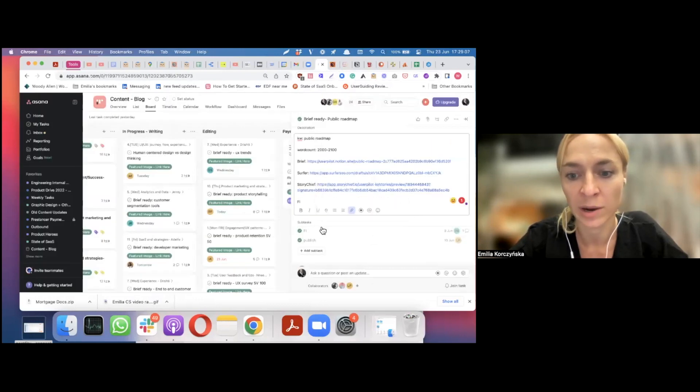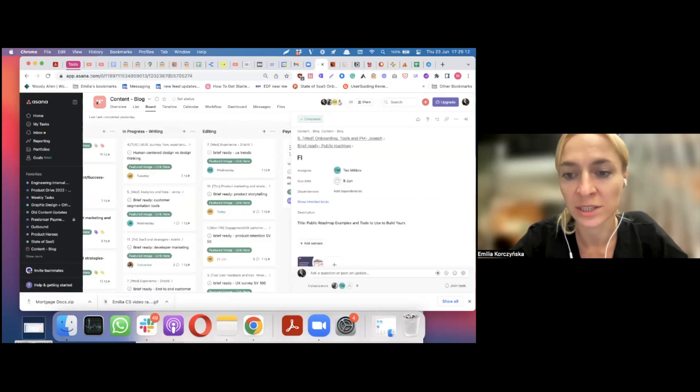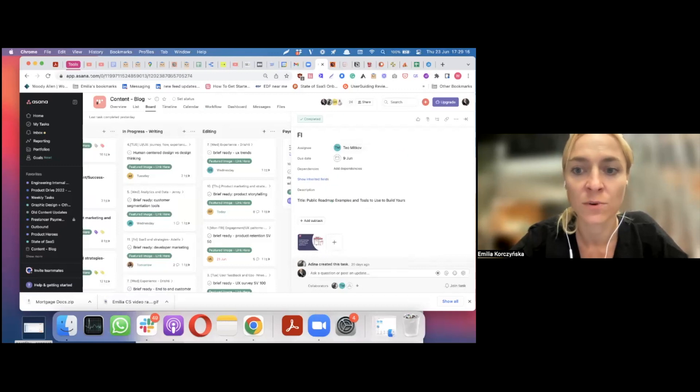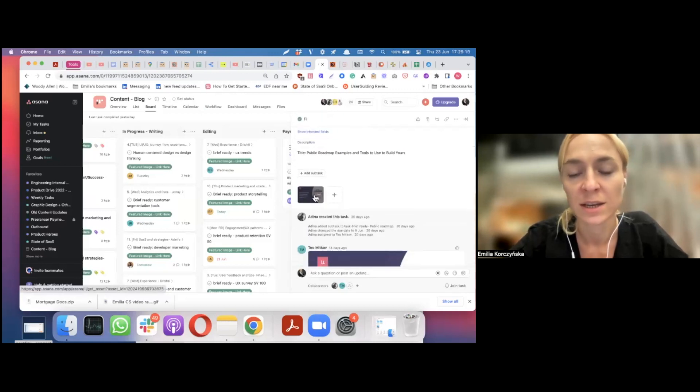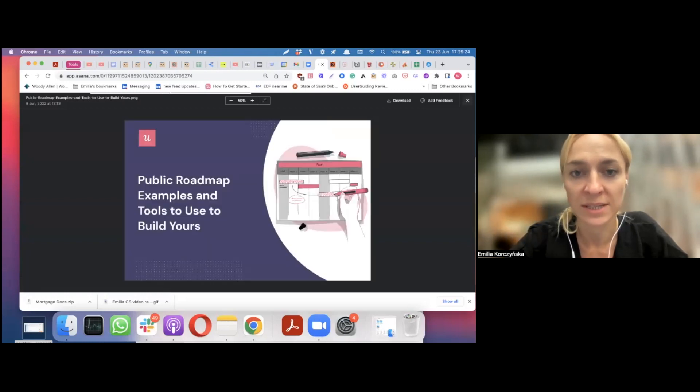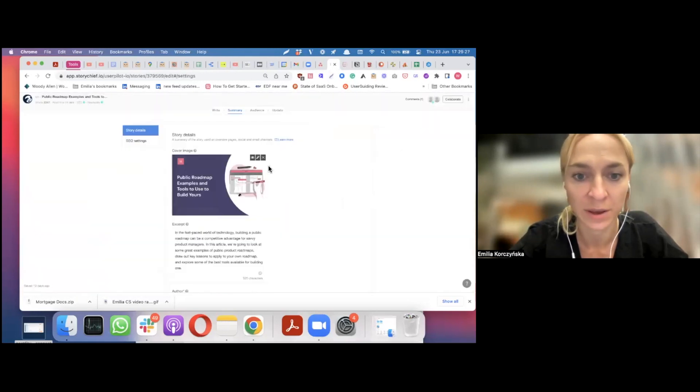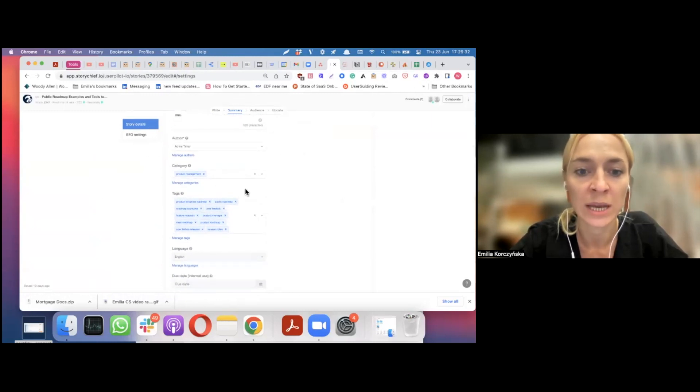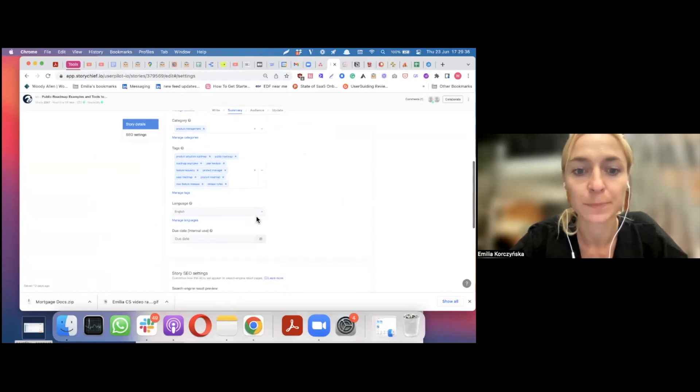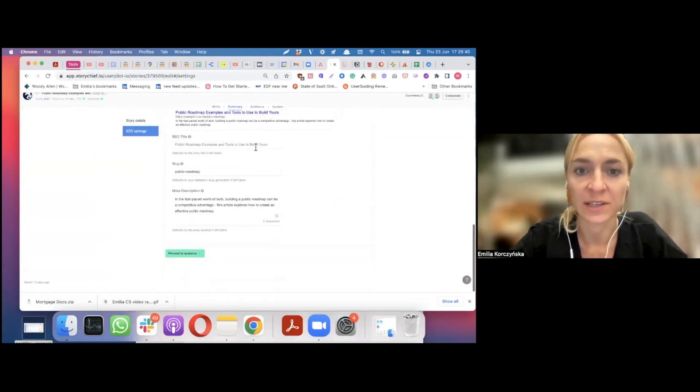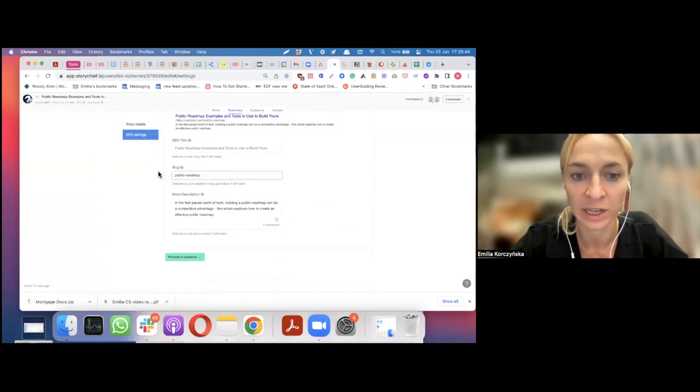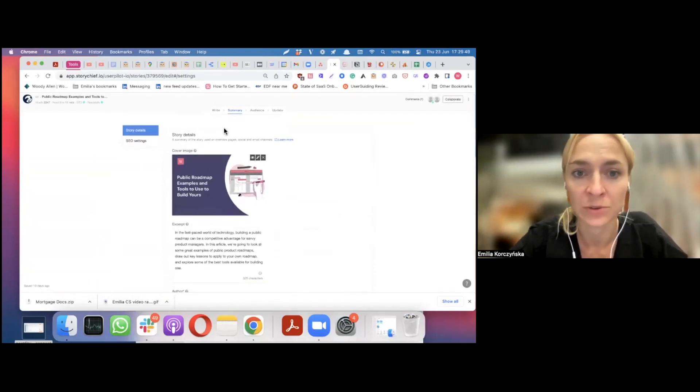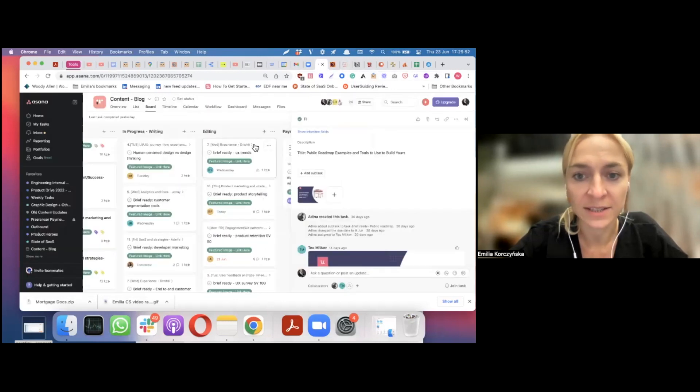So, essentially, we created a rule in Asana that automatically ends the task for the graphic designer to create the featured image. So, the writers, when they start working with this task, they already have the featured image to include here in StoryChief. They also add a meta description, meta title. The editor actually adds the right categories and tags. And also check that everything is fine here, that the writer follows the SEO guidelines in our checklist. Like, slug includes the target keyword, for instance.